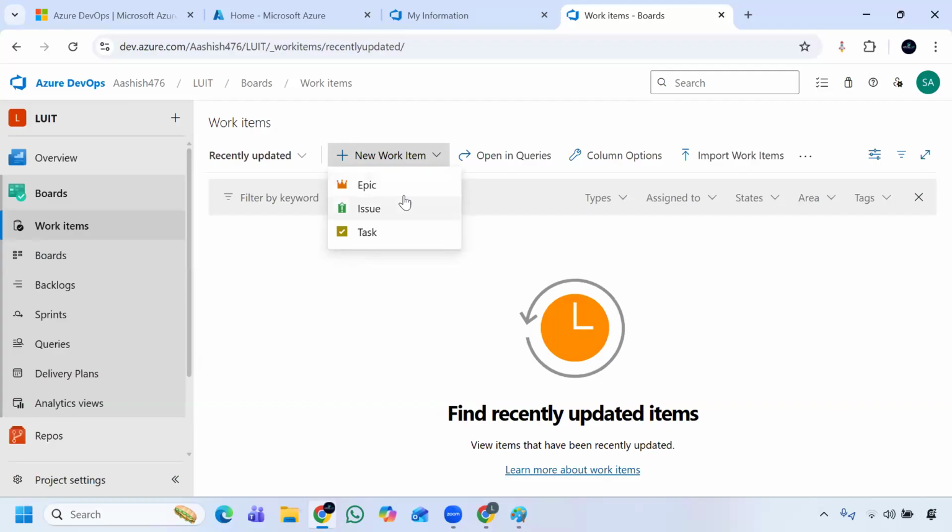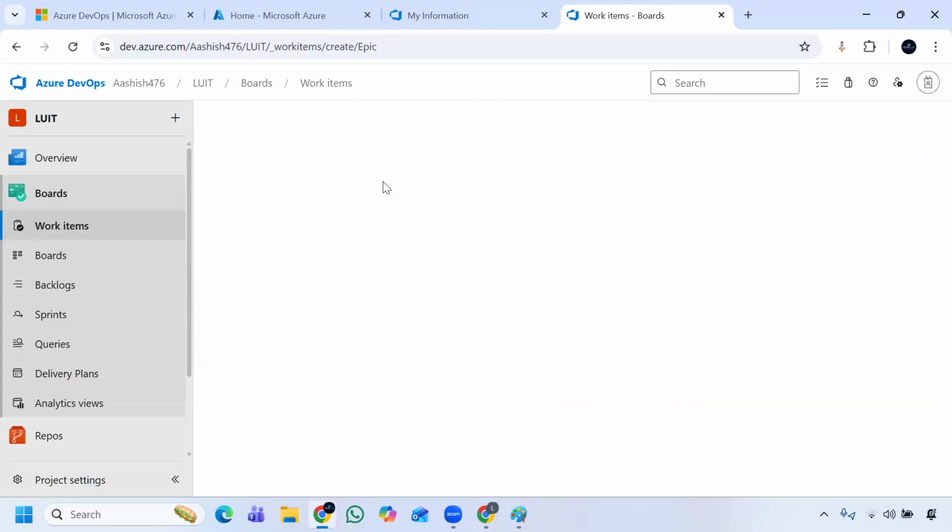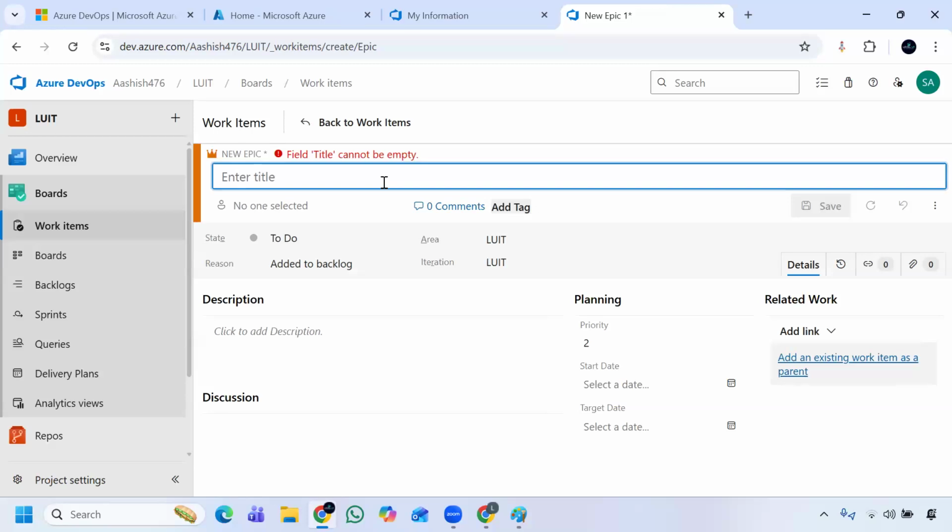Epic will be very high level. They will mention something like, I want a food order management app. In that, they will mention that you need to create a food order management app that should support online ordering and track the delivery. They will give the high-level info. After that, within the epic they will be creating subtypes: how many tables you are expecting, what tables you need to create. Like that they will split it. Okay.